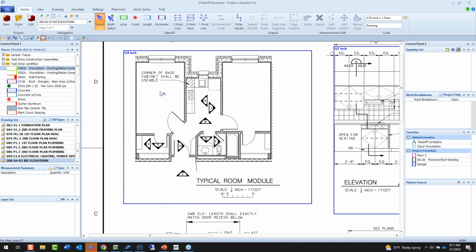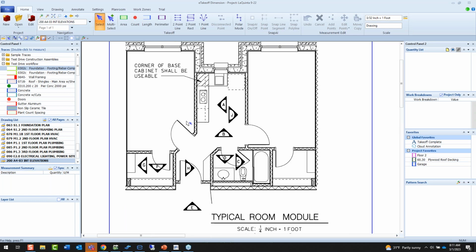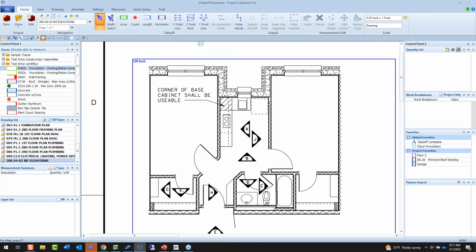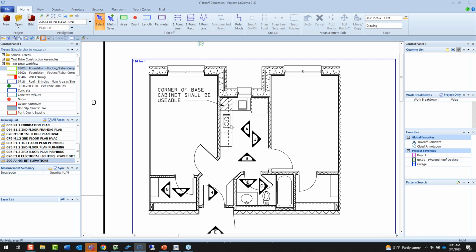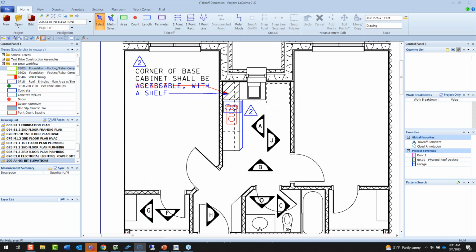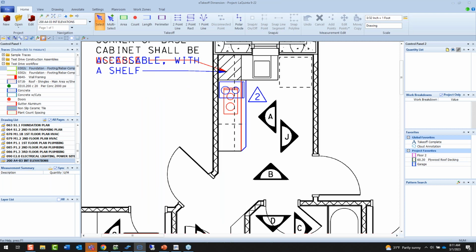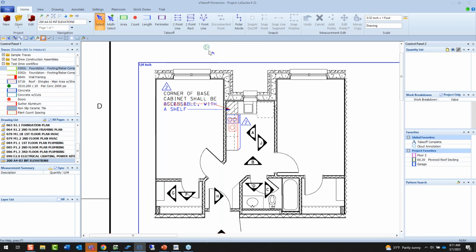One last thing I'm going to show you, and then I'm going to get into some digital takeoff here, start working through that, is the capability to, of course, overlay, compare one page to the next. I've already gone through the process of aligning this page here, but just so you know, you get that addendum, that revision. We have the capability to overlay that. Blue's new, red's old. Make the change to the takeoff that you've done, and you're off to the races, so to speak. So it gives you that capability to do that overlay and do it very quickly.